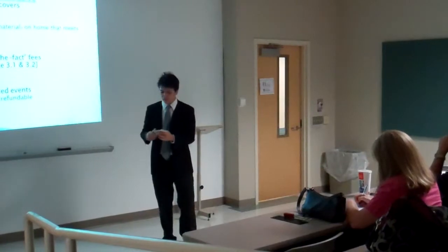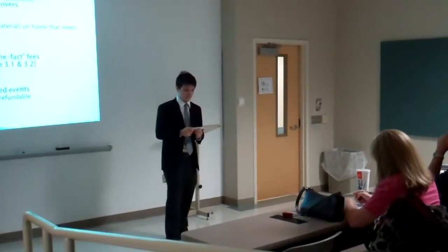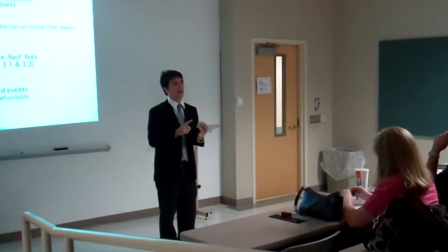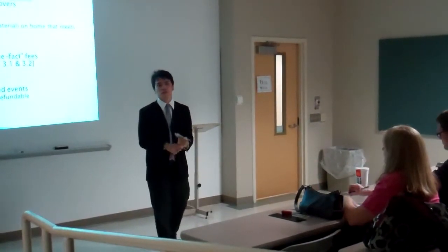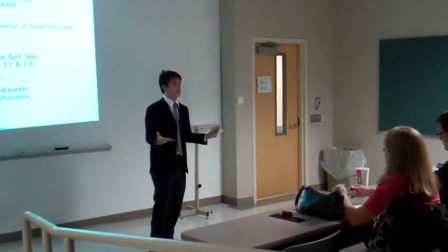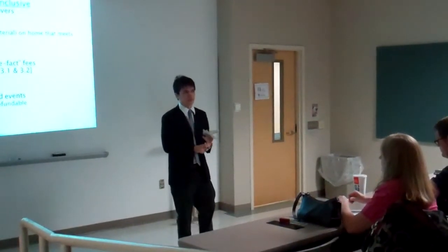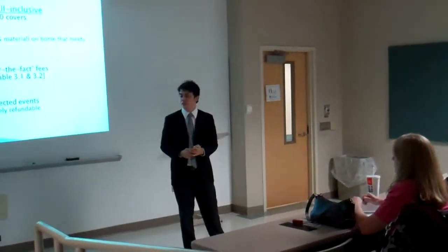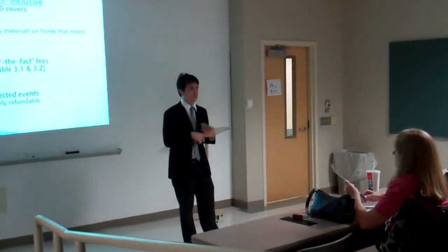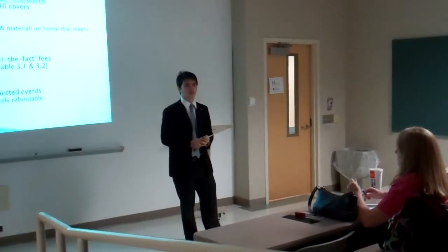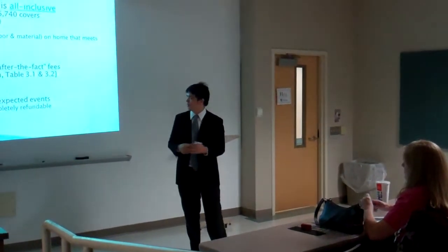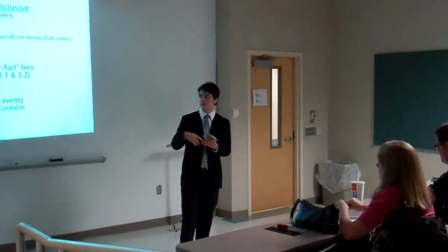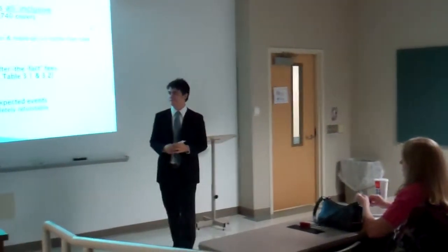Finally, our budget is adaptable, meaning after all the work is said and done, we have allocated $5,100 to risk uncertainties. That's out of the initial $36,740. So you can rest assured that those risks that Melanie talked about will be covered under that budget. No more costs will be incurred by the homeowner. And I hope that instills a lot of confidence for the cost part, and I'm going to turn over to Reggie to close the project.